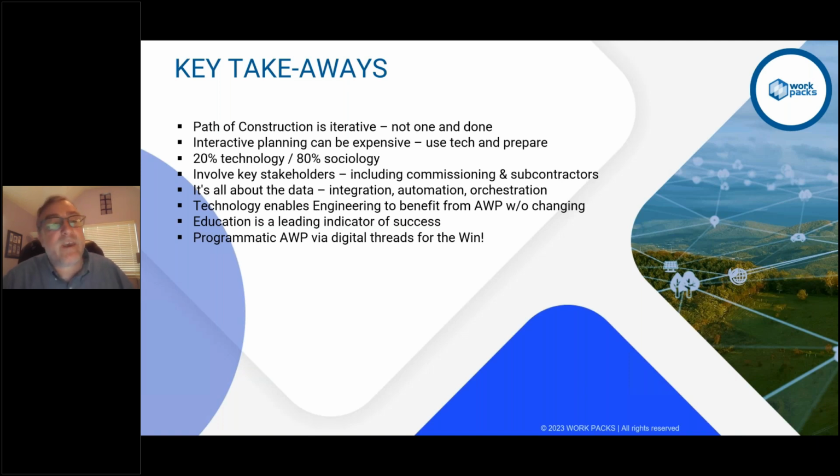The 20% technology is super critical, but understand that a lot of the lean concepts come through here in terms of the big room, the accountability, the accordion, and the last planner types of concepts in the production planning, right? But AWP makes the distinction in terms of having dedicated planners to do that sort of planning aspect, and that still holds true if you ask me, right?